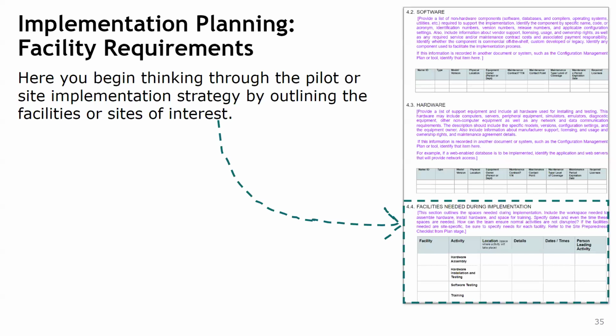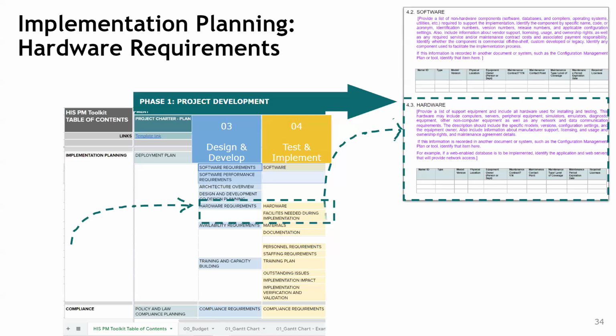And then other things like the material which is being used. We had an issue with one of the organizations where we were deploying, where the donation identification numbers were not produced locally. Then they had to be purchased in another country, but the process took longer than we planned. So in those cases, that needed to be planned in advance, so that you make the purchase and ensure that the delivery is done before you run out of stock. So those are the things that need to be planned for.